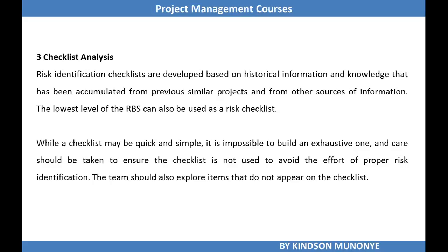The lowest level of the resource breakdown structure can be used as a risk checklist. While a checklist may be quick and simple, it is not possible to get a comprehensive one, and care should be taken to ensure that the checklist is not used to avoid the effort of proper risk identification.